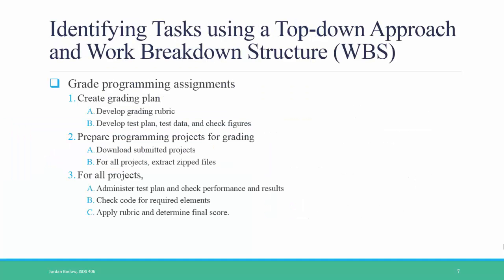Scheduling a project works best when you first identify the tasks you need to complete and then organize them in a top-down approach using a work breakdown structure. A work breakdown structure is essentially an outline of all the tasks that need to be done, organized in different levels. For example, if the project is to grade some programming assignments, you can break it down into: 1. creating the grading plan, 2. preparing the projects for grading, and 3. doing the actual grading. Under each of those three steps, you list the specific tasks needed. After the work breakdown structure is created, you can start assigning time, people, and resources to these tasks to create a more detailed project work plan.